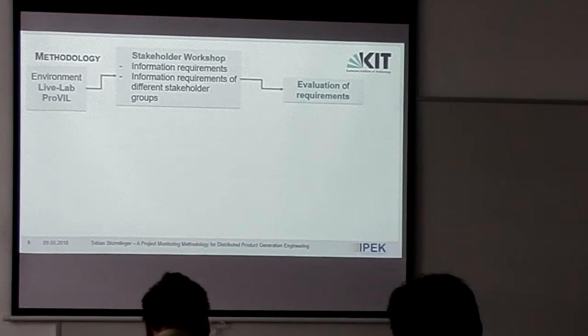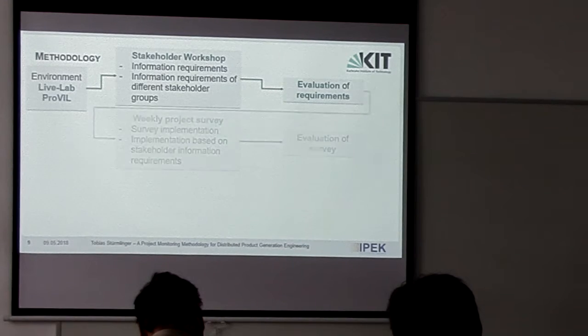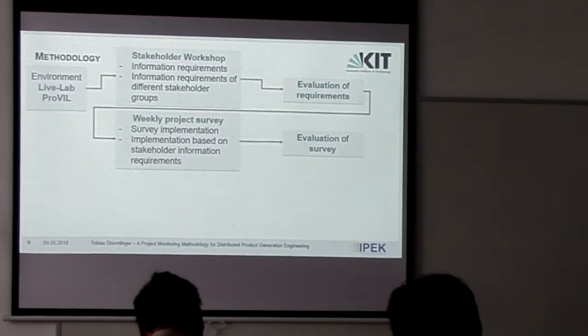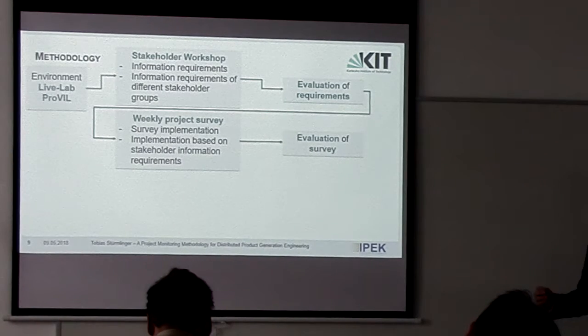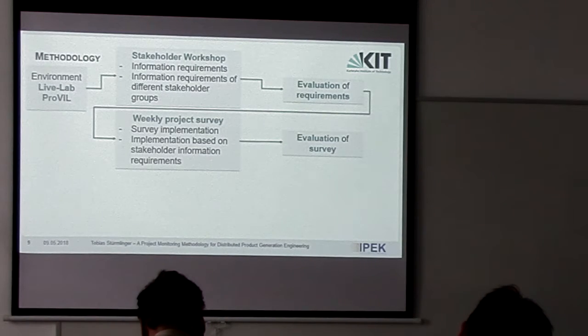To the methodology, first of all, we conducted workshops with the different stakeholders. I'll get to the stakeholders later. And then we evaluated their different requirements. After that, a weekly project survey is conducted with questions, some of which are asked every week, and some of which are asked in another turnus or singularly.